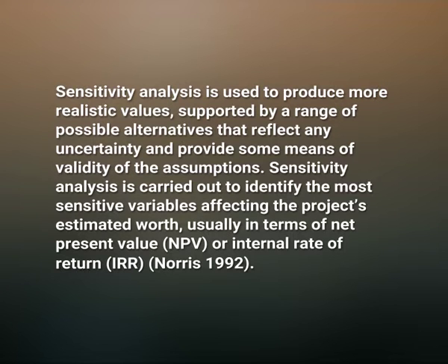Norris 1992. Sensitivity analysis is used to determine the effect on the whole project of changing one of its risk variables. The technique aims to identify the risks which have a potentially high impact on the cost or time scale of the project. A major advantage of the sensitivity analysis is that it shows the robustness and ranking of alternative